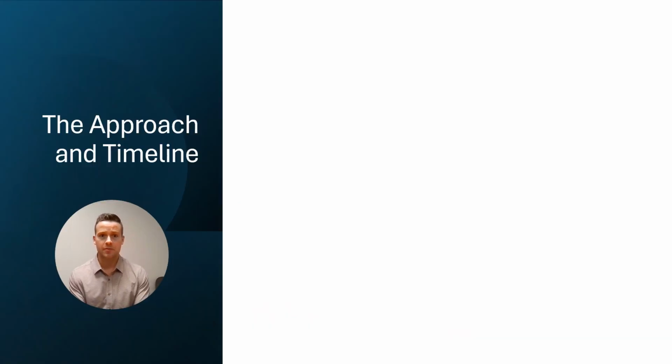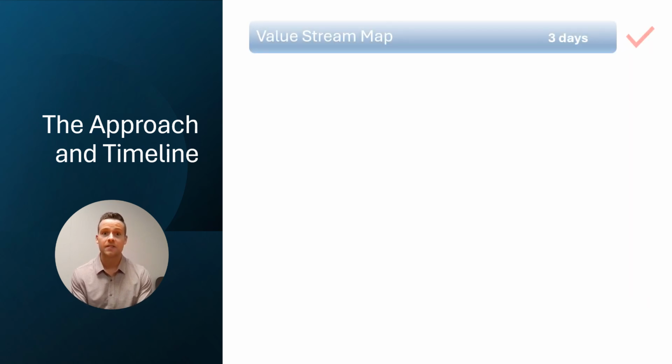Our approach to improving the supply recovery process involves several key steps to ensure measurability and timeliness. We have already mapped out the current state of the value stream for the four major IE processes: initiating burndown, daily burndown management, burndown restrike, and burndown communication. This allowed us to identify baseline cycle times, areas of waste, communication flow, and improvement opportunities.